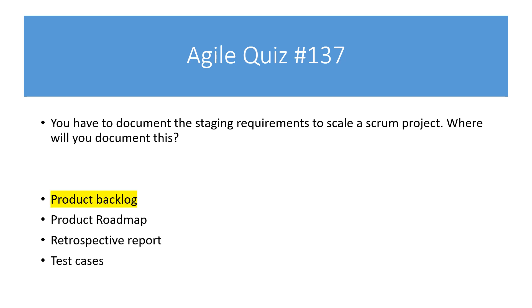The answer is pretty straightforward. There's only one place we can document the requirements in an agile project, which is the product backlog. Product roadmap is used for long-term perspective, retrospectives are for capturing data from the retrospective, and test cases are part of the sprint execution.